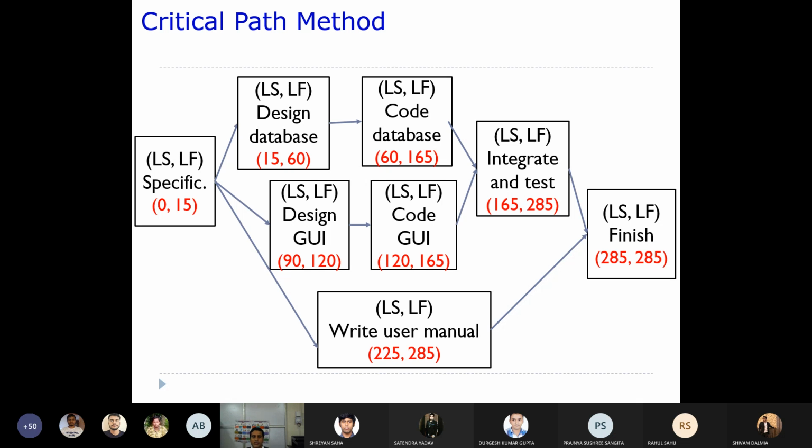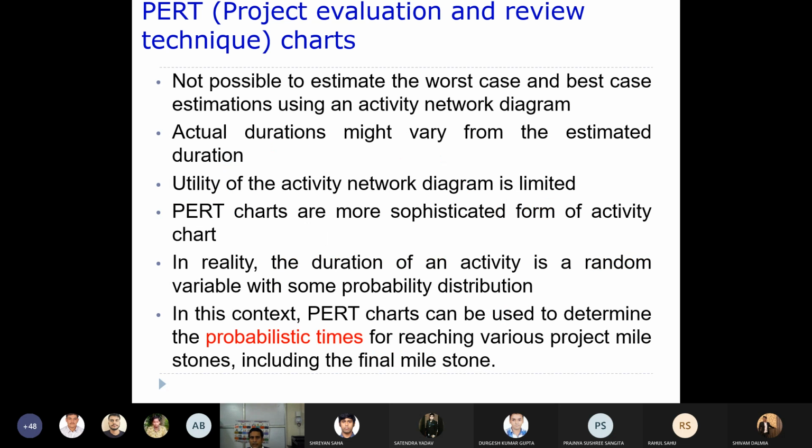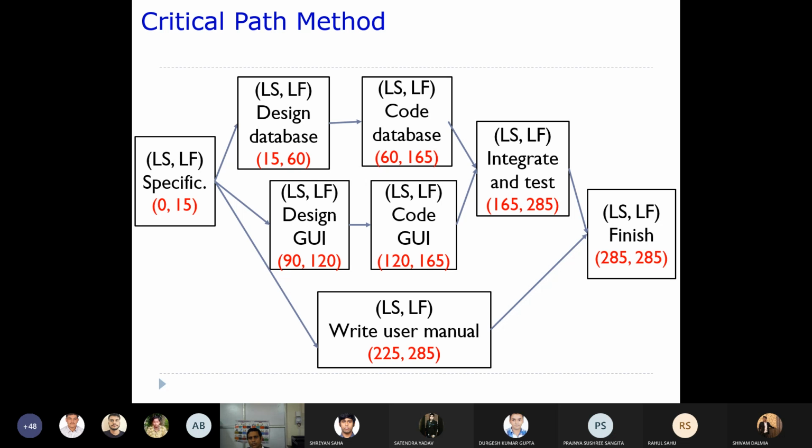And your earliest start is always 0, right? So when you are calculating earliest start and earliest finish, whenever a particular task is dependent on two different tasks, you take the maximum value, whereas in the case of latest start and latest finish time, you take the minimum. That is the difference. You can go through the slides and the definitions again, calculate it, and you will be able to see. So once you have the LS and you have the ES,